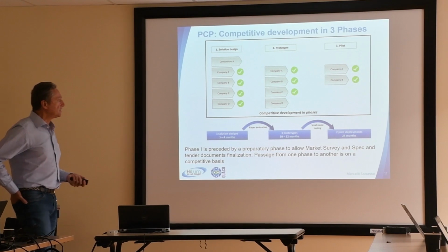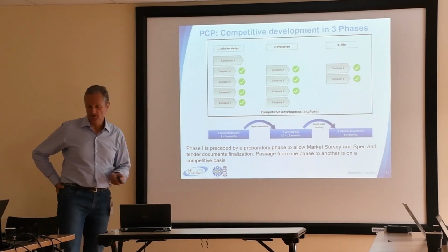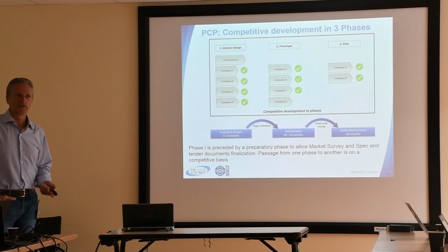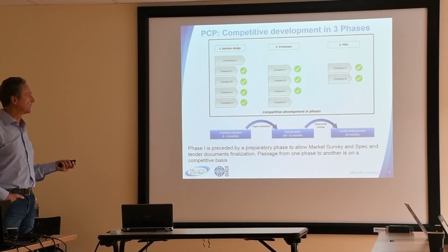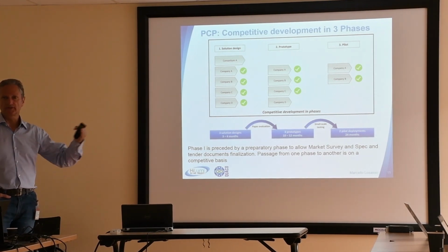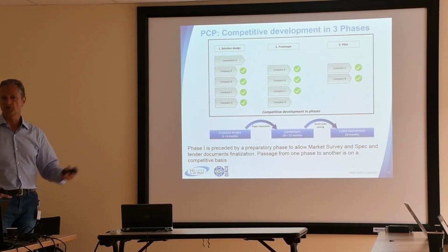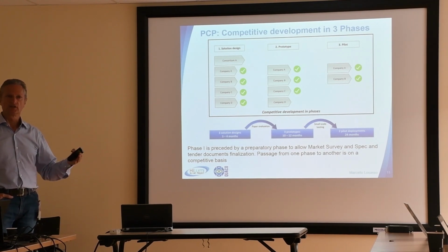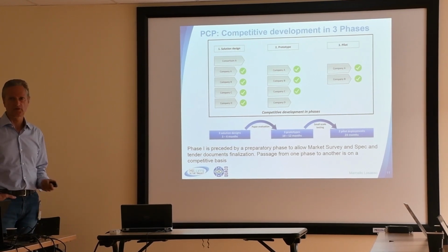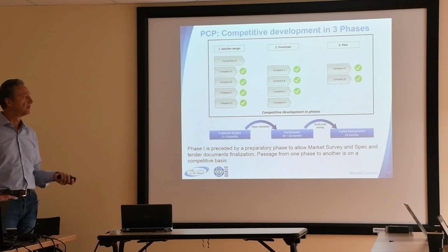Market survey is also mandatory in this project. Open market consultation is what it is called in European language. You have to follow a certain kind of procedure for announcing this process on the electronic journals. Procurement people know these things very well.